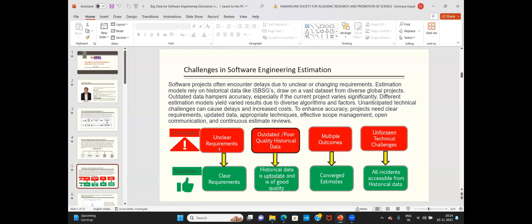You may not have a clear, concise, well-defined document describing the requirements. Also, your historical data may not be up to date — they may not have taken the pains to use configuration management and baseline the data, measure the different project parameters, and baseline it. It may not be updated, may be poor quality, not consistent, and may be missing elements that are critical to the estimation process.